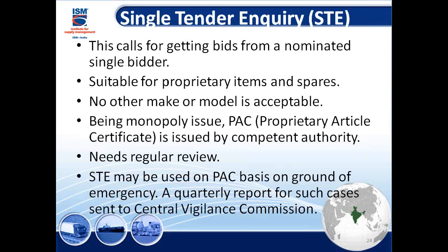Now here come single tender inquiries. Basically for proprietary items, where there's no one else, just one supplier who makes it. You are left with no choices, so you have to go to that supplier. But keep in mind, it needs a regular review. The market is not stable once and for all. It's not static, it's revolving, it's changing. New supply sources are coming in.